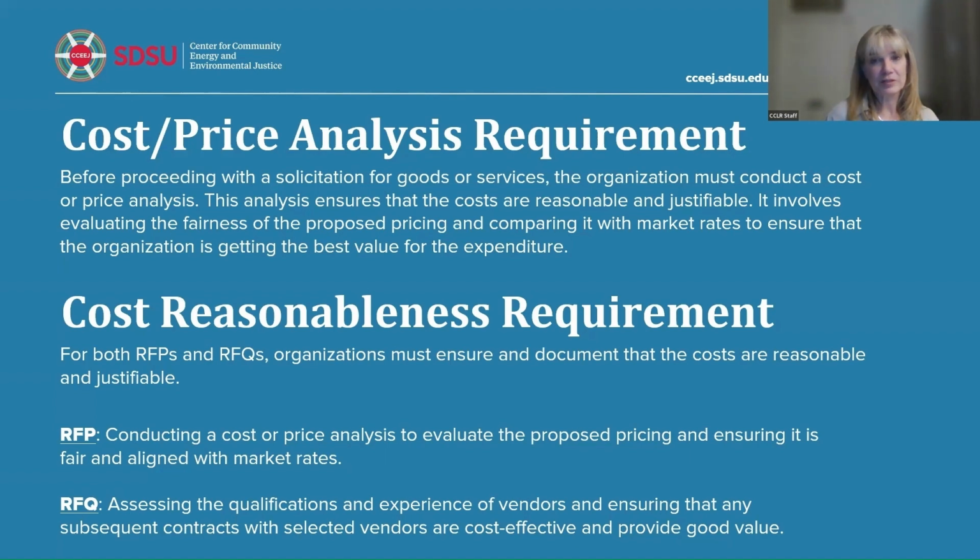Okay, so the cost reasonableness requirement, for both RFPs and RFQs, organizations must ensure and document. That is the key. You have to document that the costs are reasonable and justifiable. Okay. So is it a dissertation? No, it's just, you can write it down, you can make an electronic file, but you must document it somehow so that if you ever get audited,